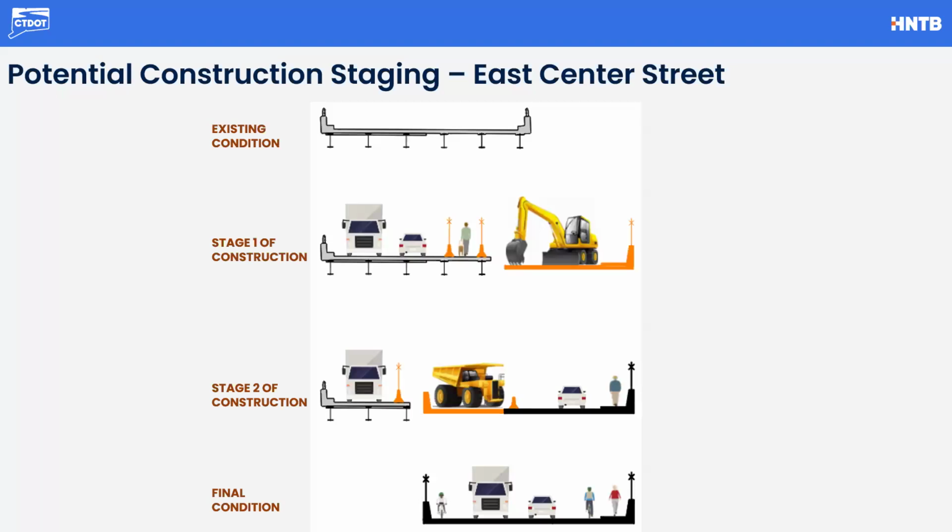That would allow the new bridge to be constructed to the side, which would be the southern side of the roadway, away from the ramps. Stage two then would allow the pedestrians to use the newly built sidewalk and move some traffic to the newly built bridge and build the rest of the bridge. This would require some realignment, but it is a likely scenario that could happen.